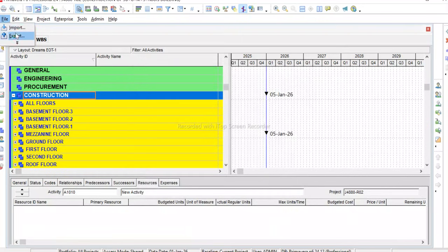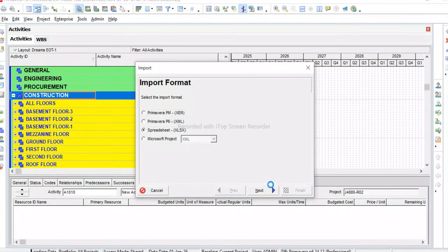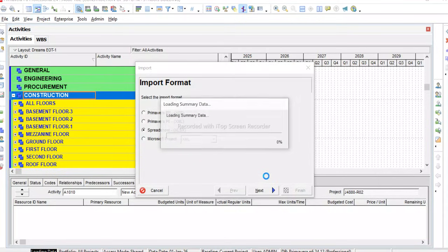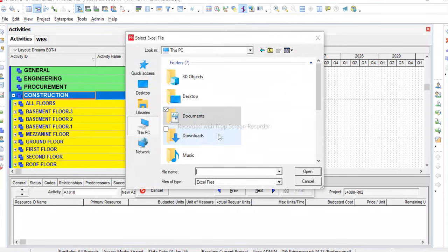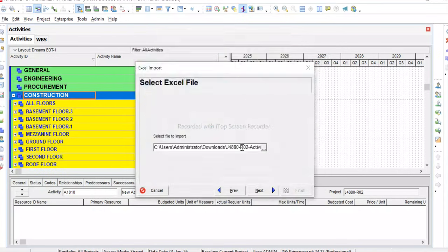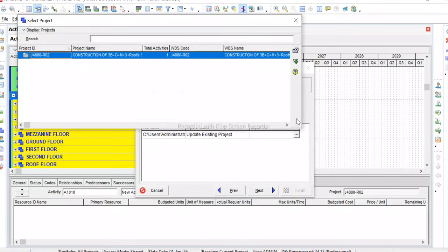If there are thousands of activities, it doesn't matter if you have created the WBS path very accurately, then you will have all the activities in your program. So I advise that you create the WBS path first very carefully, because it is Excel. If you make some mistake there, it will be multiplying.